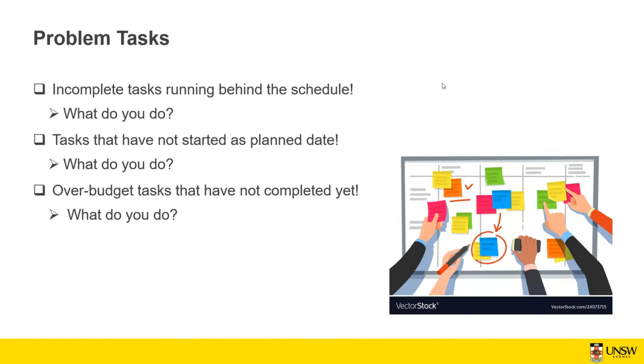Yep. First of all, identify the problem, see what you can do, and see the way that you can reduce the cost. Maybe you can rearrange the staff working on that, or order the material with good quality but lower cost in order to reduce the budget. If you foresee that this task is going to be massively over budget, then perhaps now is the time to organize a meeting with the owners and the stakeholders.